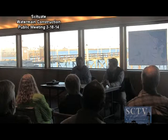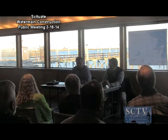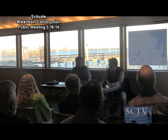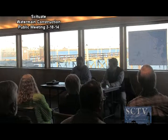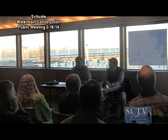It's going to fall on the contractor how they want to do it. So we don't know that, yeah. We don't know. We'll have a pre-construction meeting with him, and he will explain how he wants to do it, because technically he could start with two crews and do one on Lighthouse, one on Rebecca, and do the whole thing over. And after that pipe's all connected, then usually they come back with service crews that make the tie-ins from the main pipe to everybody's house, and they do the replacement on that.